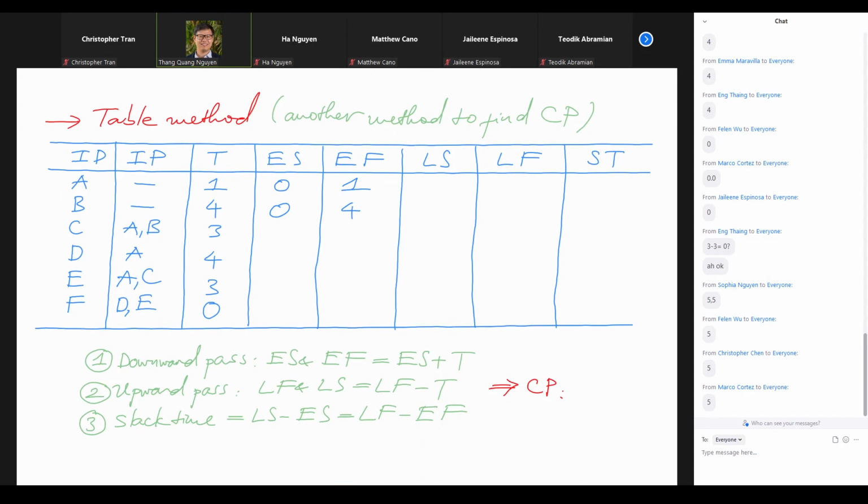C is a little bit more confusing because we don't have the arrows to track. Then you just ask yourself the following question. What comes before C? A and B come before C. So we have to finish A and B before C. To finish A and B, you look at the end of A and B. A is finished at 1, B is finished at 4. So it's natural that we would select the 4 here.